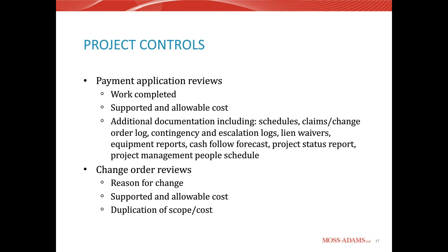and that your funds are going to meet the schedule. And as Peder talked about, the change orders, you want to review them for the reason of the change. Just make sure that it's appropriate. Make sure that it should be funded by you as the owner and not coming out of contingency or being back charged to a subcontractor or something of that nature. You want to avoid duplication of scope and make sure that you're not paying for something that should be included within the base scope of work.